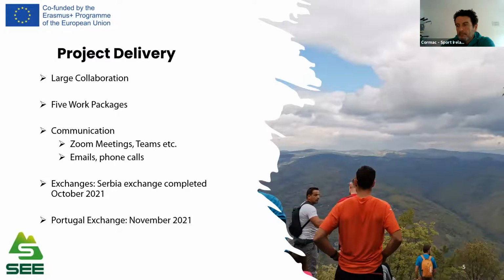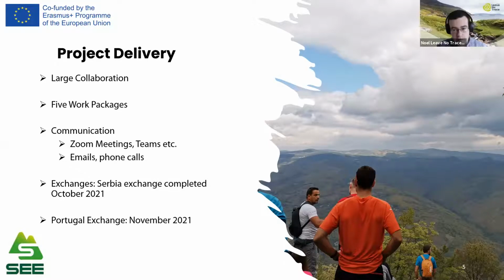The project delivery, as I said before, was a large collaboration. As Emma said, you have to break down your project into a number of work packages. We have 5 work packages, from work package 0 to 4. Work package 0 is the coordination and the administration of the project, in which Leave No Trace are the lead organization, and me as the coordinator, which involves setting up meetings, organizing the governance documents, the collaboration, and making sure that every other work package is working effectively.